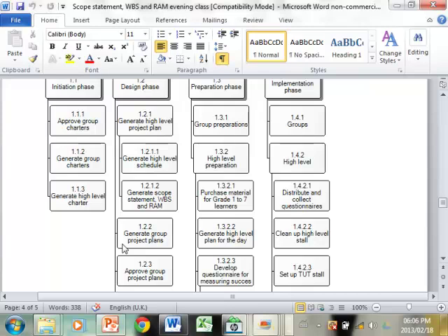And depending on how your relationship is with your supplier, you might end up combining the work breakdown structures to have a complete work breakdown structure. But very often this is proprietary, so you will just stop at the engine level, and the rest of it is like a black box to you, as long as you get the engine that does what it should do.